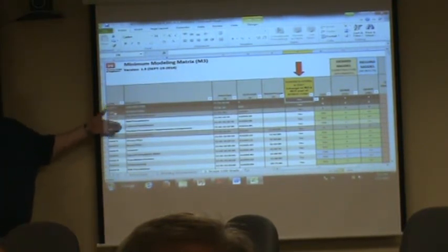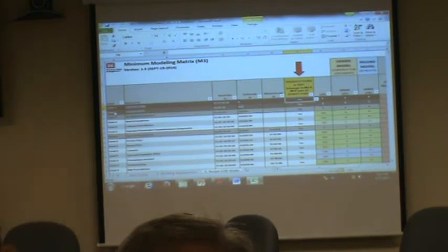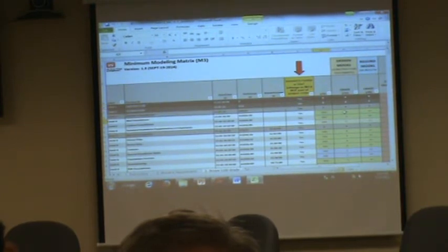It's actually Omniclass, Uniformat, and MasterFormat, so basically you can do either. The whole idea is that you go down this column and say whether or not something's in your contract, yes or no. If it's no, it'll just blank out. And it gives you an idea of what level of detail, what grade I need for the construction documents, and what grade I need for the record model.